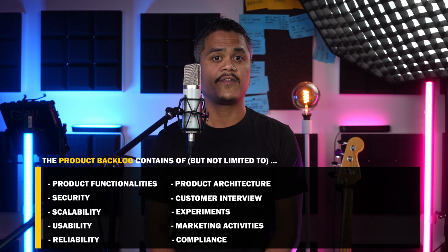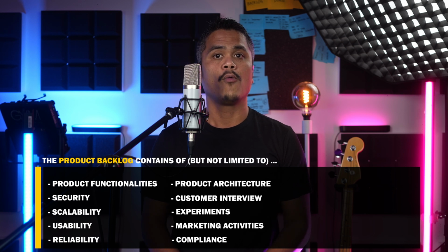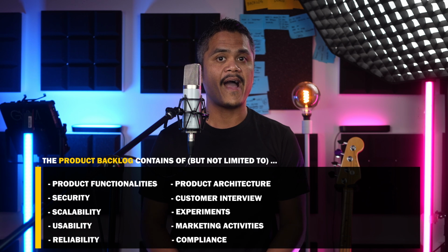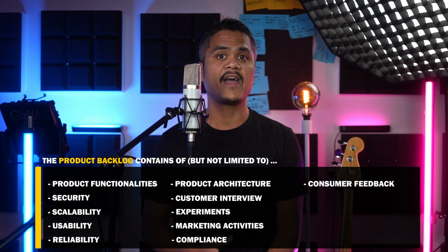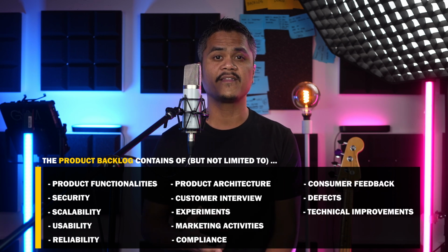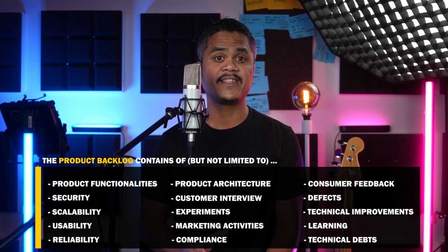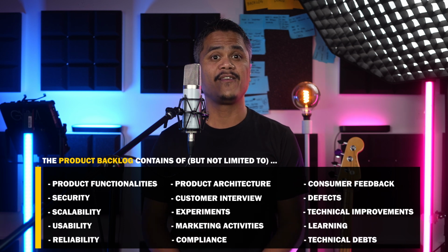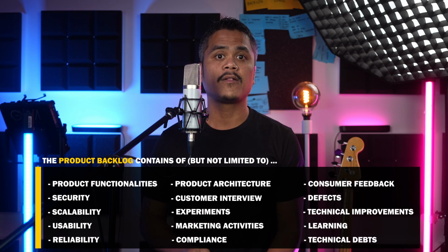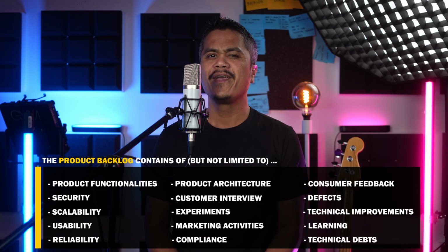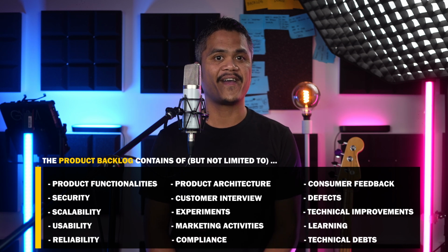Because Scrum is an iterative approach for developing products, when the product is being continuously released and used by the consumers, the product backlog will also contain consumer feedback, defects, technical improvements, learning, and even technical debts. As long as the product is being used by the consumers, the product backlog will be continuously filled up. You can say that the product backlog is a living artifact.